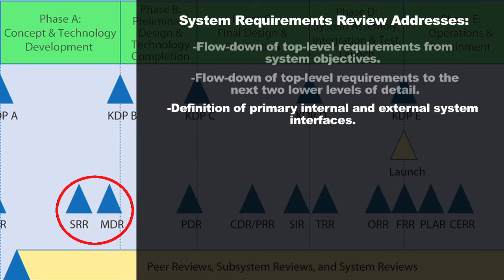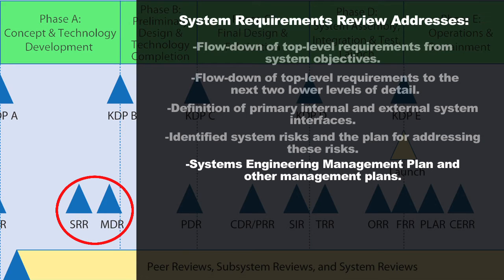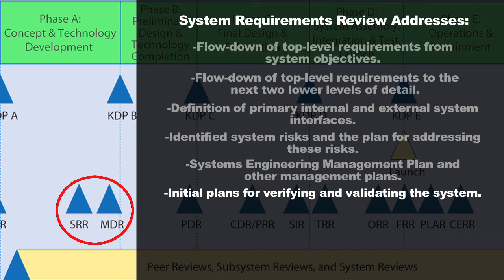The team will also look to see if all the internal and external system interfaces have been clearly defined, that all the risks for development have been clearly identified and there's a plan for addressing them, and that a system engineering management plan along with all other management processes and tools have been put in place. They'll also check that there's an initial plan for verifying and validating the system. A requirement might be a performance capability — for instance, a thruster needs to provide a certain amount of thrust.